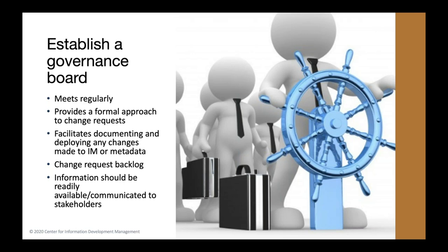What is your ship cadence? When are you going to push out those changes and make them available? You need a change request form. You need to itemize your management support. You need to really document who your stakeholders are and the RACI of those stakeholders. And then also create a change backlog, right? These are the changes that we are not doing right now, but we keep track of them for the future.